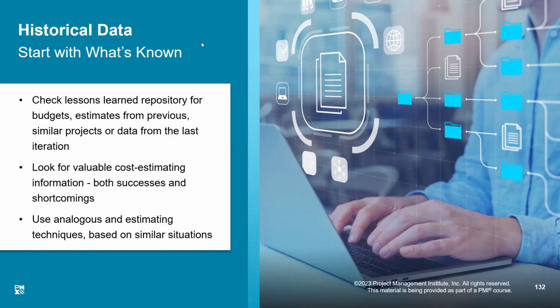And I told you when I was describing all these 4 methods, the most accurate and the most detailed method is bottom-up estimation, which is the detailed calculation for each activity. For each activity, we calculate how much money is required to do this job, what the equipment cost is, what salaries are, and we add that up to calculate the cost of that activity.